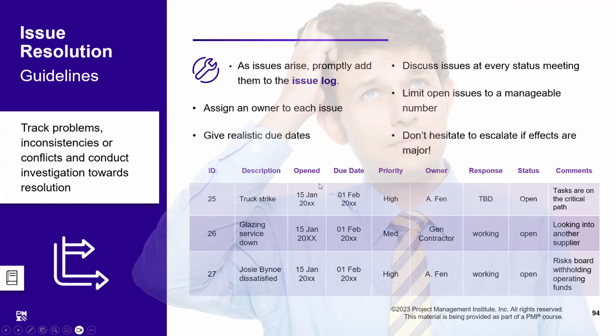Moreover, as soon as we identify a risk, we allocate a due date to that. Generally speaking, from the day a risk or an issue has arisen, we fix 15 days to resolve that issue. So the due date is 15 days after the issue has been identified. If the issue was raised on 15th of January, 1st of February would be the due date for this issue.